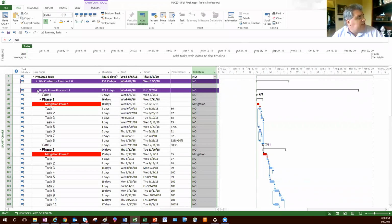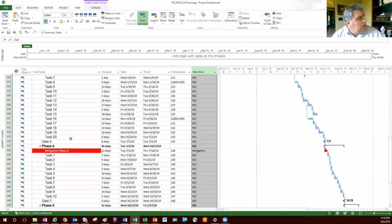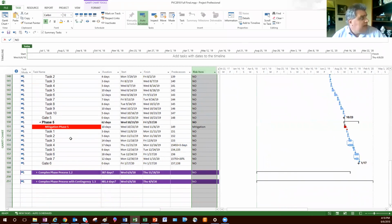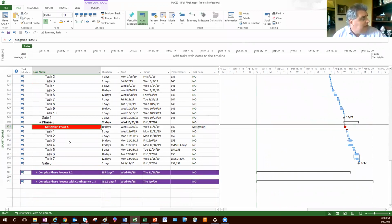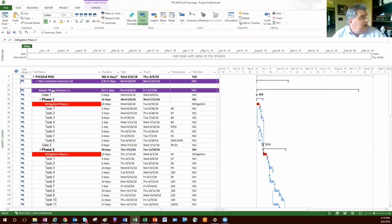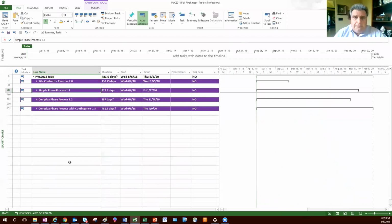Okay, so this is a really simple item. On this particular one, I didn't add any contingency plans because I was just mitigating. It was not complex enough, and the risks were not bad enough. I said, you know what, I'm not going to do any contingencies. I'm going to accept whatever is left after I do my mitigation and reduce the probability of these things happening. Okay, so that's one way of doing it. And remember, that's for simple projects, small teams.